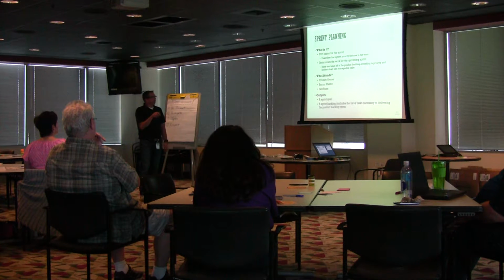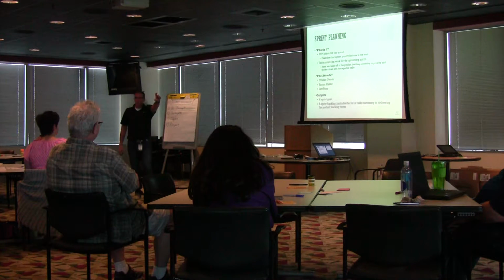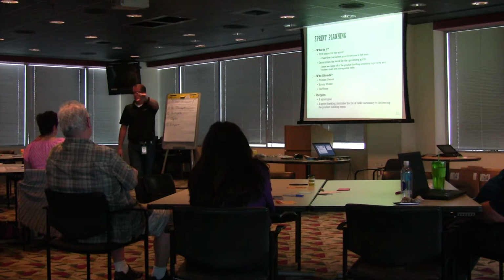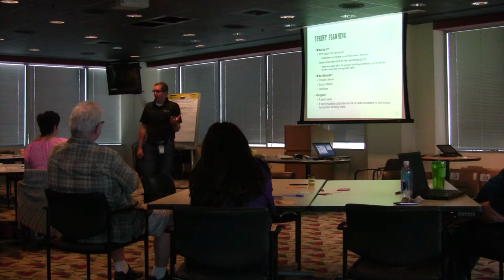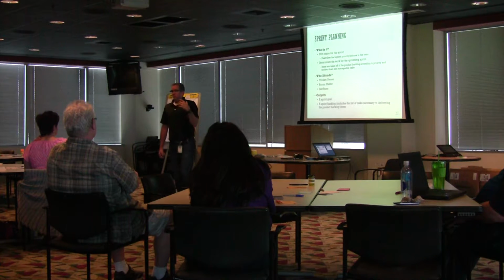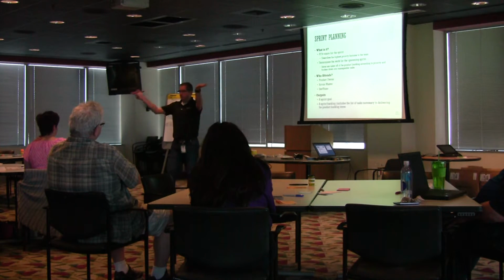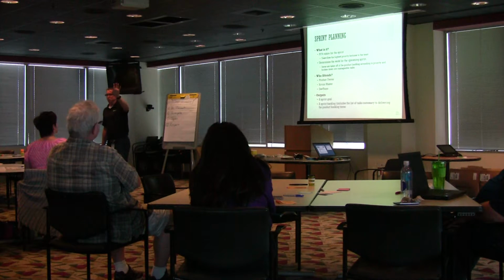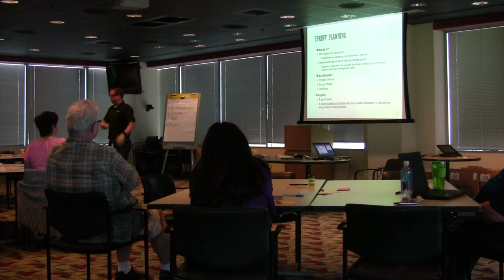They're taking them off the product backlog according to priority, broken down to manageable tasks. So you've got a story, which is just a mechanism to have a conversation. That's the work item you might hear, or PBI, product backlog item. So this is the thing. This is what we're building. The UAC supporting thing, which is my target. And then I might task that out. What do I need to do in order to achieve that thing? Make sense? So that's what we're talking about here.